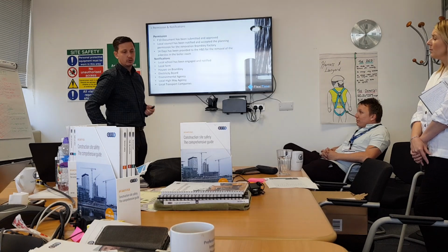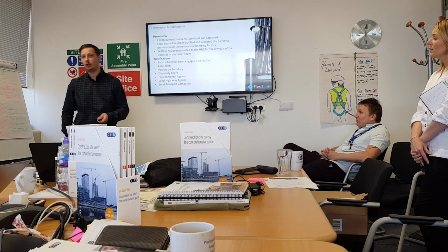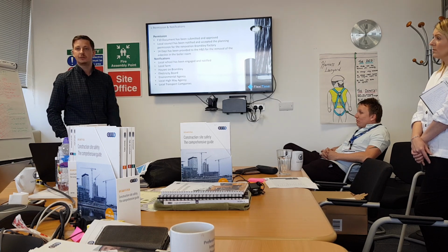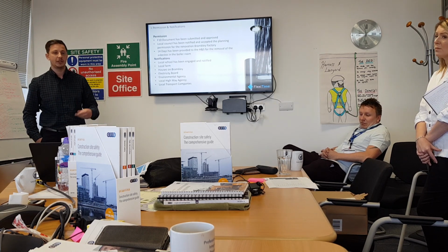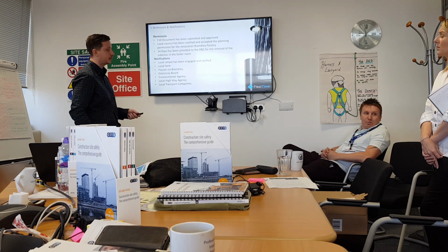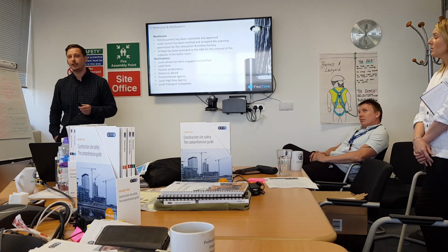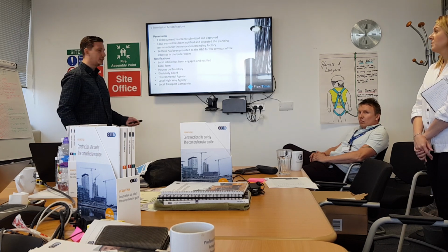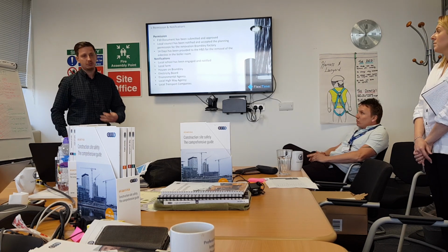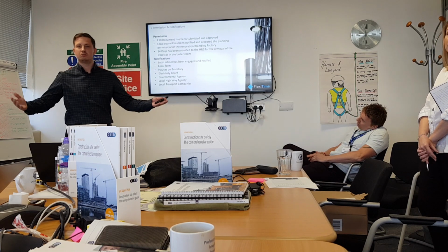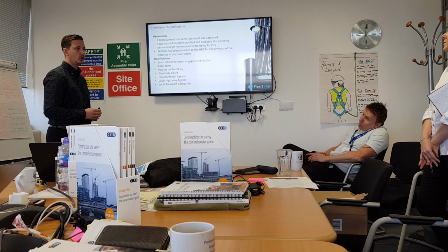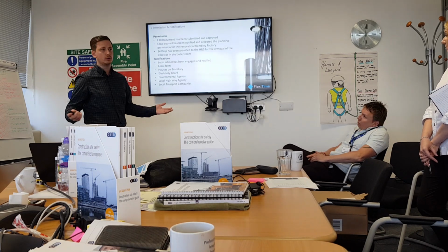With asbestos removal as well, we've had to make the HSE notifiable. We've given them 14 days notice, we're just waiting on the final signage, sign-offs for that, and hopefully we can get the ball rolling in phase 1 with the asbestos. And on that, we have invited the HSE down as well to take a walk around the site, just to get in cahoots with the local HSE there, and we're not hiding anything, we're not doing anything wrong. Make sure that the site's set up correctly, they're happy with everything, and everyone goes home safe at the end of the day.